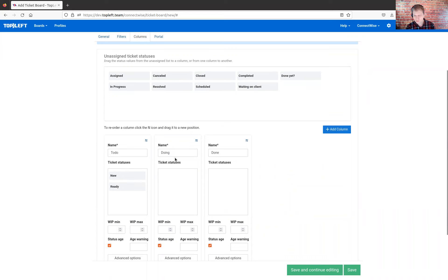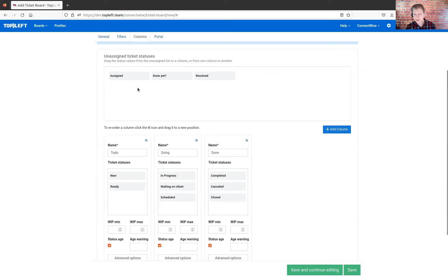So I say if a ticket is in the 'new' status, I want it to appear in the to-do column. And there might be other statuses as well — maybe 'ready' is also best in the to-do column. For doing, that would be 'in progress,' but maybe also 'waiting on client' and 'scheduled.' And then finally done — that would be 'canceled,' 'closed,' and 'completed.'